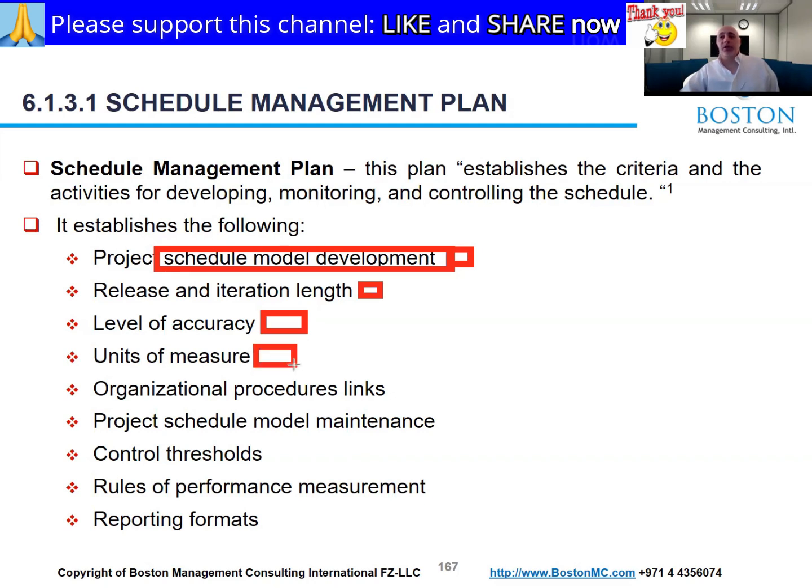The unit of measure, you want to know if your schedules are read in days, months, weeks. Very, very lengthy projects could actually be scheduled in weeks or months if you want, but most of the time we're using days. In IT, sometimes they try to use hours, but I think only in Excel. They typically would not use software for that.